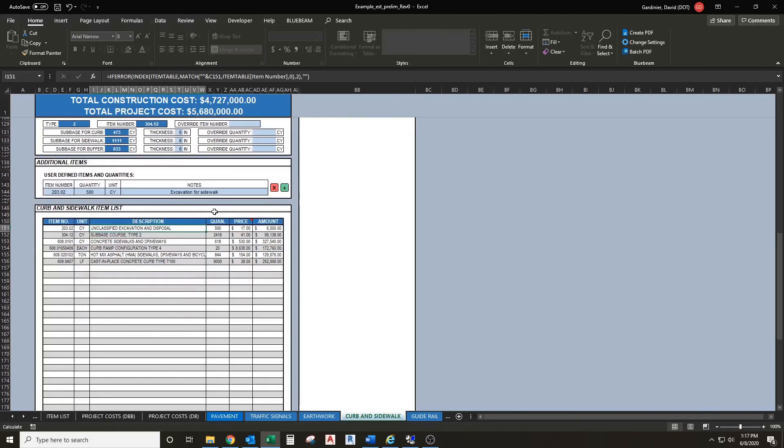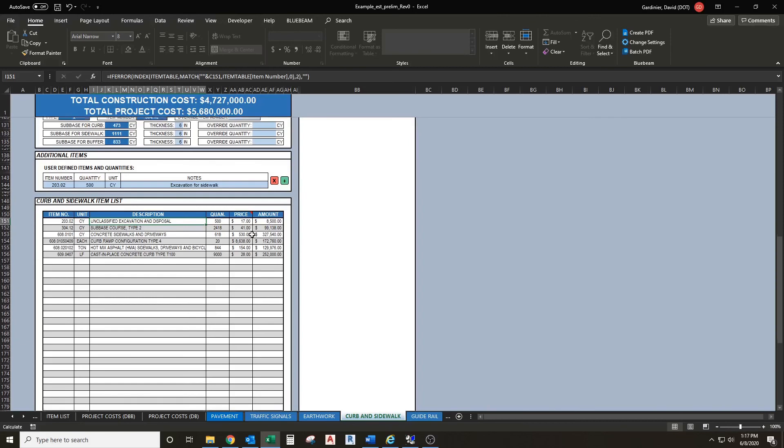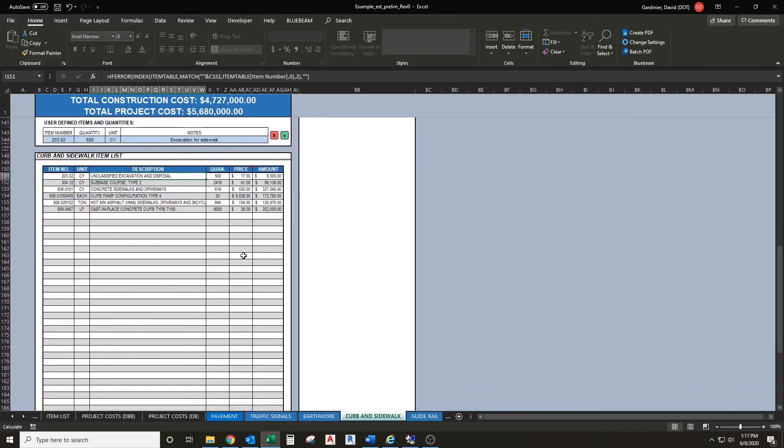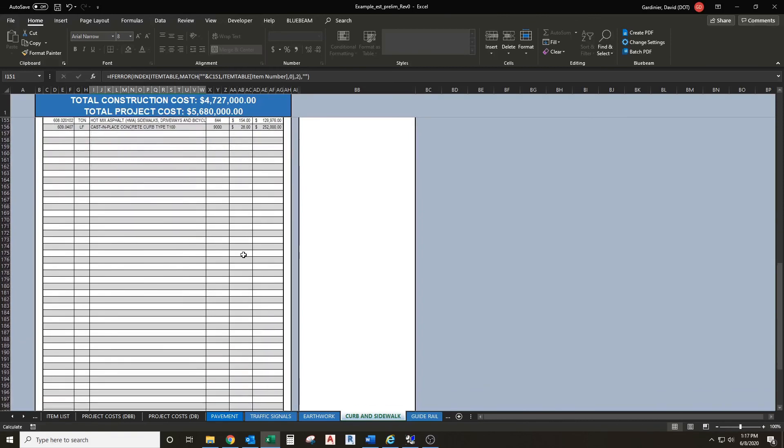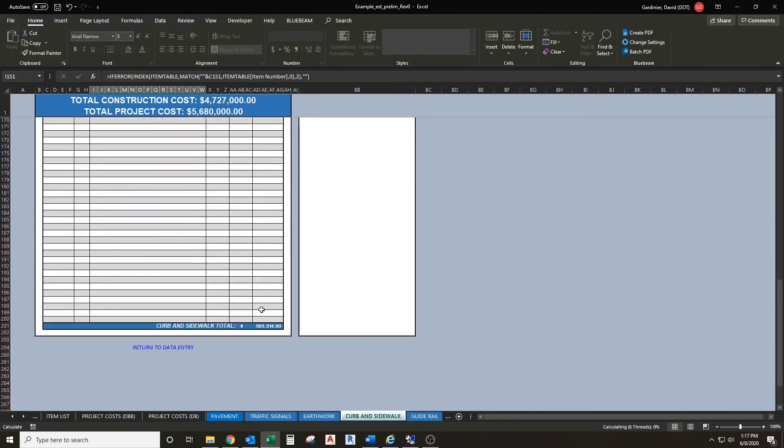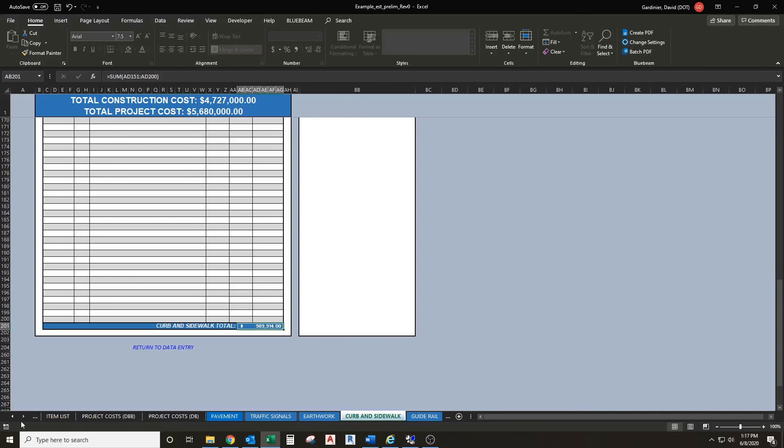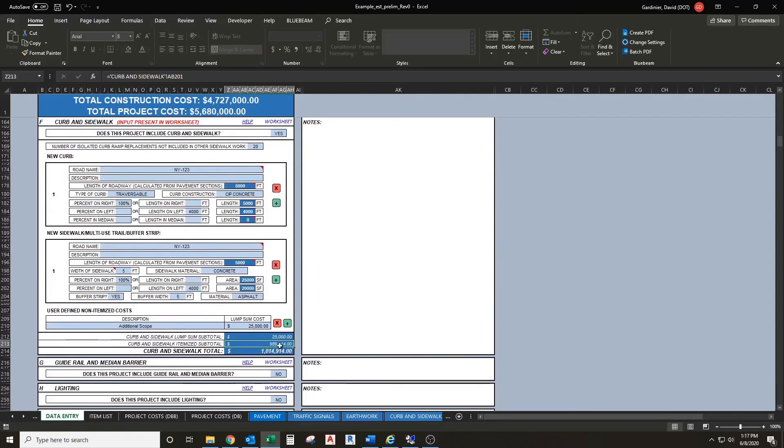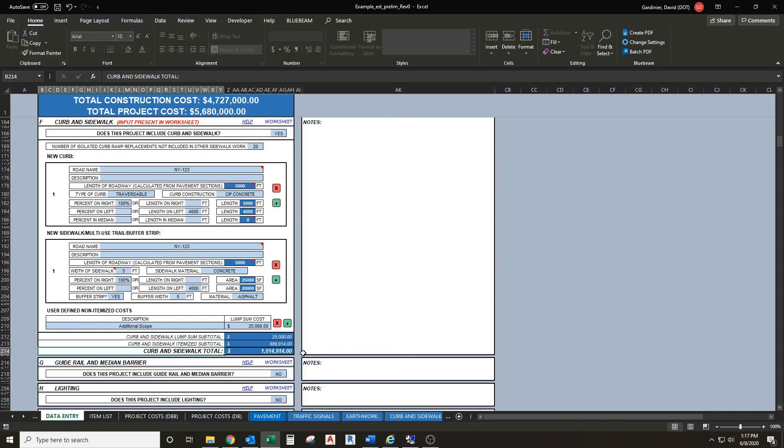Everything is summed together, unit prices are automatically generated, and a subtotal is created down at the bottom here. This number is referenced back into our data entry tab in the curb and sidewalk itemized subtotal, and we have our curb and sidewalk total.